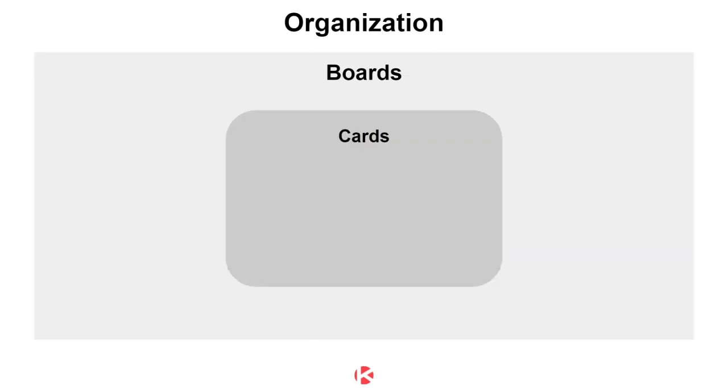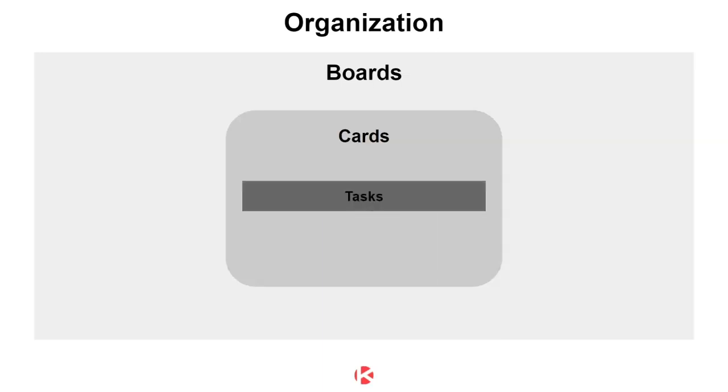These boards have cards. And this is where everything happens. Any piece of work that you want to track is on a card, a Kanban card, which is what Kanban is all about. And these cards can have tasks. So tasks are just a way to break down your cards into actionable items.